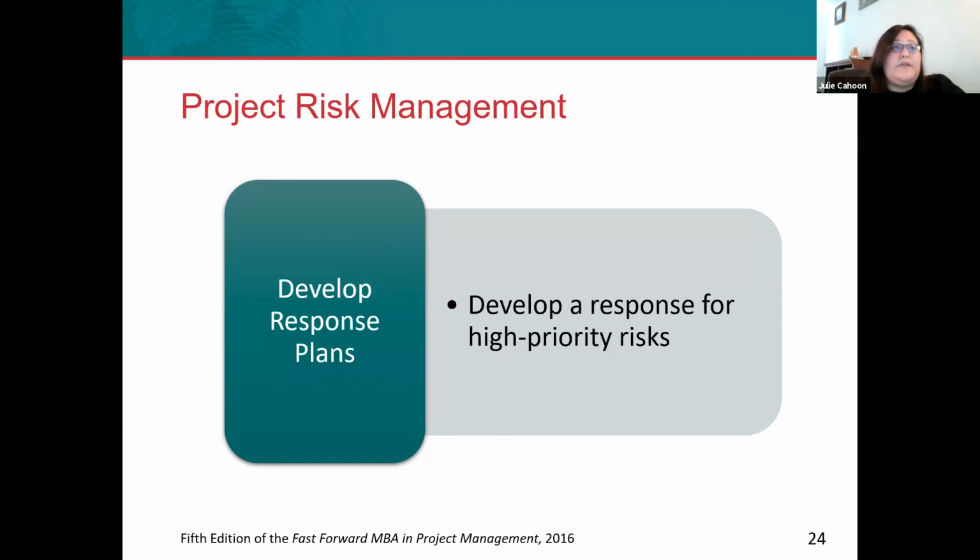And then the last choice is to escalate the risk. If a risk cannot be handled by you, it should be elevated to the program director or the funder. As a project manager, as you're working through all of the risks, you see that this is beyond what you're able to address, and so you'll want to bring it to your project director or to your funder. A final note about developing a response plan is that a strategy needs to include the project manager, the project team, and in many instances, the funder. You'll want to document the response to the risk in your risk register.